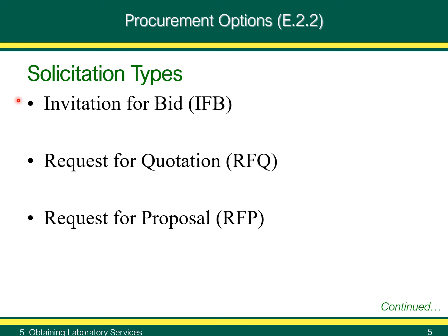A solicitation for proposals, or solicitation for offers, is issued under sealed bid procedures. This may be a two-step process. First, bids are narrowed to identify and eliminate those that are not able to meet specifications or that are technically unresponsive.